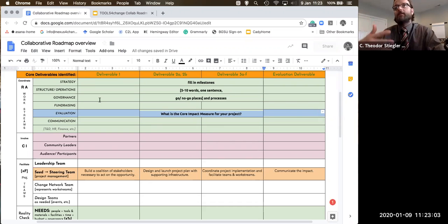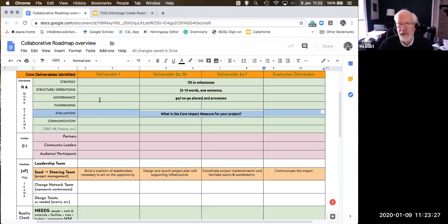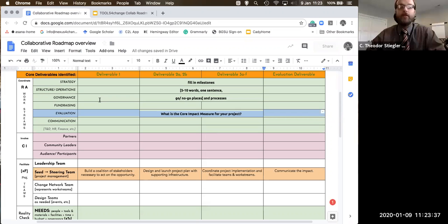That doesn't mean that's the same person that's accountable for that task. That tends to be that individual's supervisor, and there might be 15 folks completing tasks, but the manager is the one that has to report whether or not they were done. So yes, it may be meaningful to separate those depending on your specific project and not have them listed together in the same row. Yeah, I often ask, who's got the A? Because if you know that, then the A is usually going to be delegating to the people with the R. Absolutely.